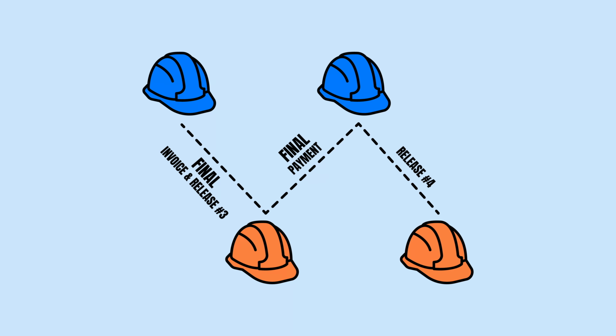Okay. Conditional essentially says the same thing as the other conditional. It says that as long as the check clears, that the waiver and the release are in place. We waive all rights to all claims to all labor and material furnished to your job. So then, as I get my check from you, we play a little tug of war with the check.